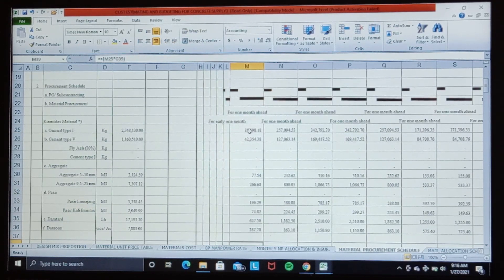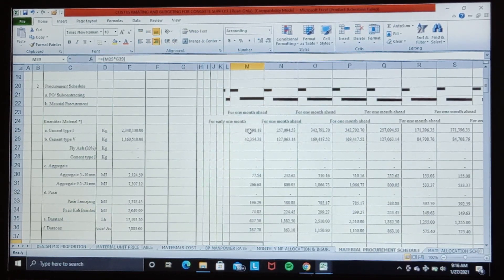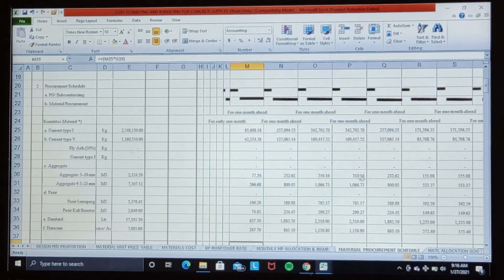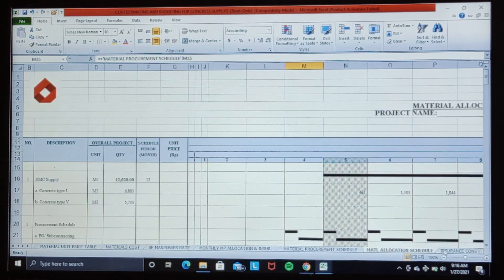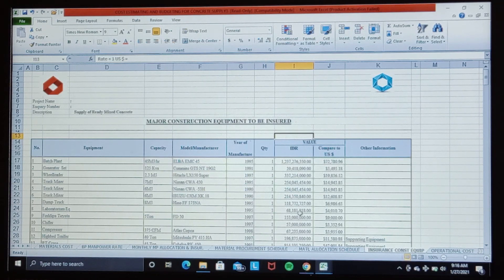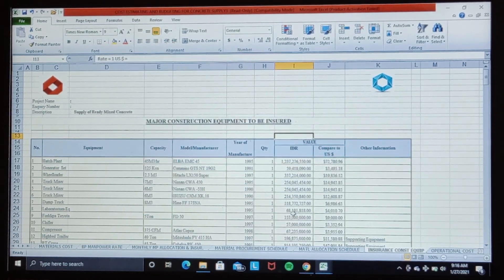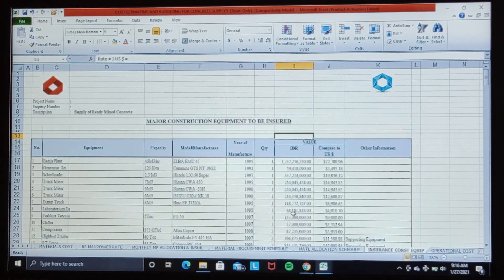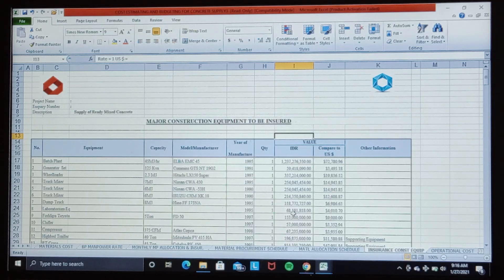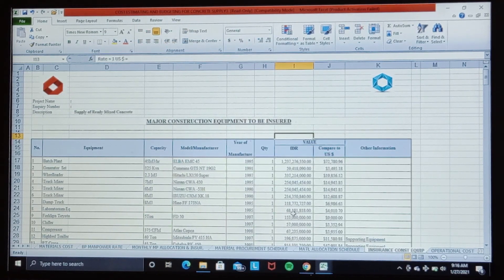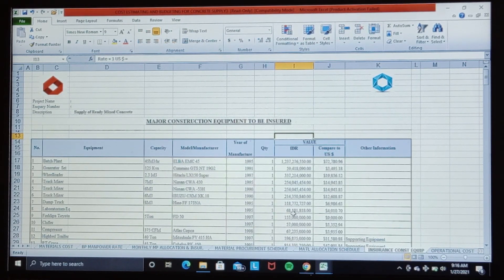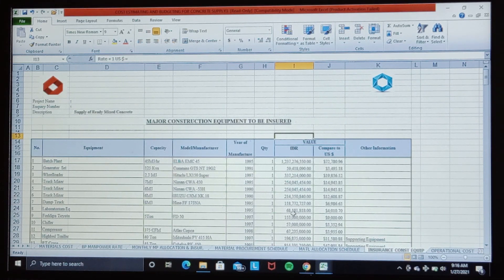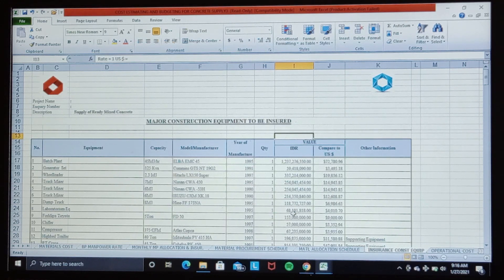Then we calculate the major construction equipment insurance. Why do we only calculate the insurance cost? Because the construction equipment has already become a part of the contract. This means that it will depend on your project nature, whether the construction equipment is included in the contract or not.